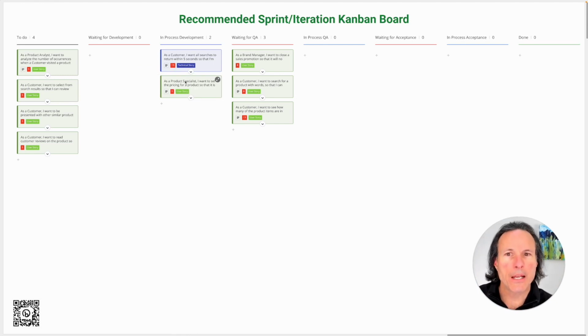So that's one more of the pieces of information that really helps us understand how much work is moving forward, how much work is moving backward, and the work that's moving backward, how long is it sitting there and waiting? So that's just some of what we're able to have additional insight into when we're visualizing our work with Kanban boards. And then we've got states in our workflow for both that value-adding touch time as well as a holding queue for the waiting time and understanding the delays that we're encountering.